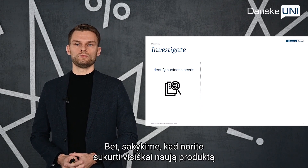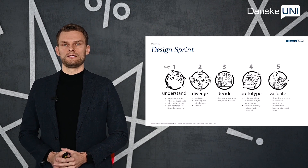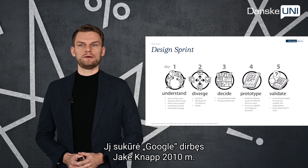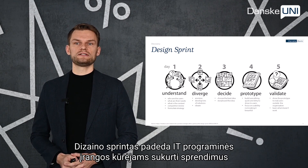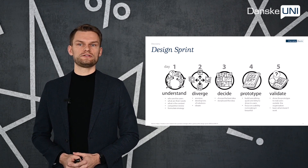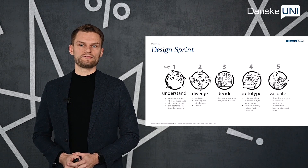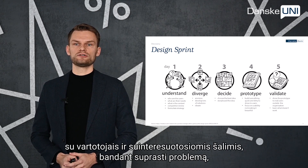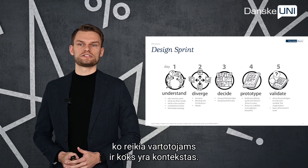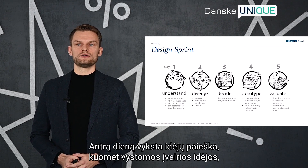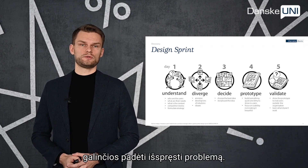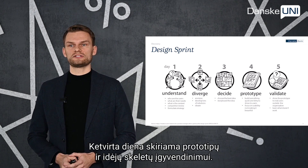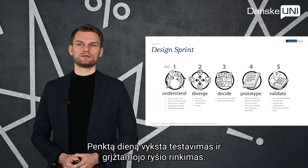Let's say you have a situation where you want to build a brand new product and a design sprint is needed. Design sprint is a five-day structured brainstorm based on design thinking and Agile development, created by Jake Knapp at Google in 2010. It helps software development teams to build a low-fidelity solution in just five days. Day one is mostly dedicated to interviews and meetings with users or stakeholders to understand the real problem, user needs, and context. Day two is when brainstorming takes place and a lot of ideas are created and sketched. During day three, the team decides on the best idea and usually starts prototyping. Day four is dedicated mostly to prototyping and building a walking skeleton of the solution.